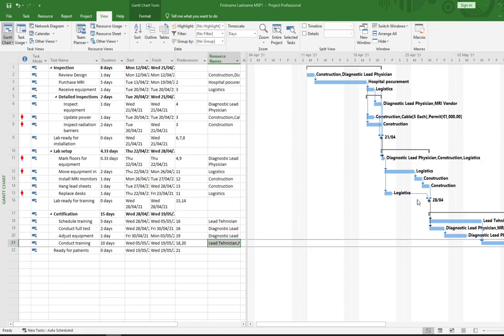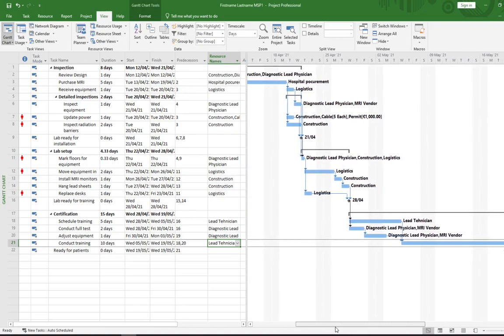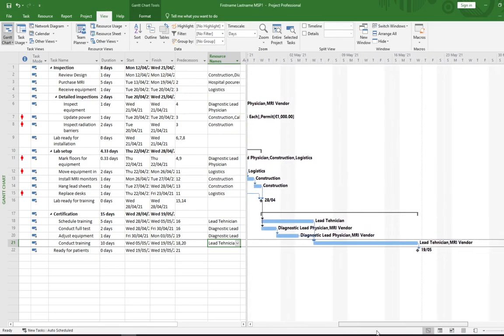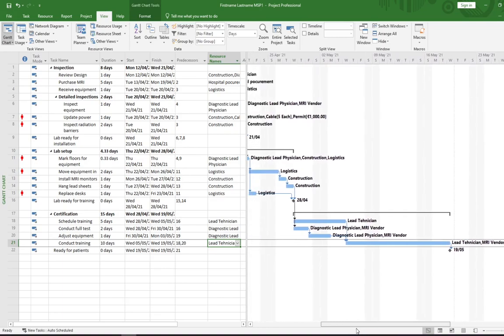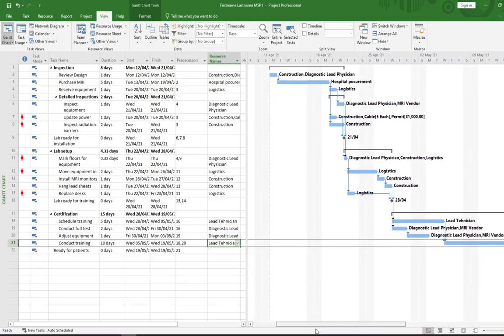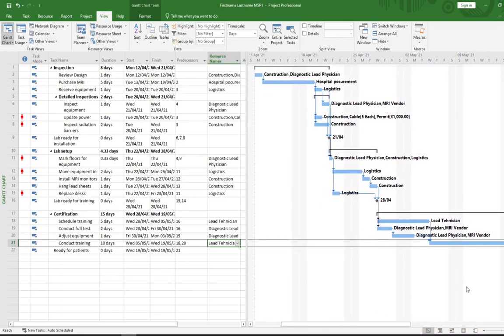Okay, so I'm just continuing on. Now I've added all the different resources. Hopefully yours looks the same. Again, you can look in the Gantt chart, you can see all the resources are added to our bar chart, which starts to make it a lot more detailed, with more useful information being presented. The next thing we're going to do is resolve resource over-allocation. To keep a schedule running efficiently and realistically, you need to keep your team busy without assigning them too many simultaneous tasks. This is where we find and resolve over-allocation of resources.